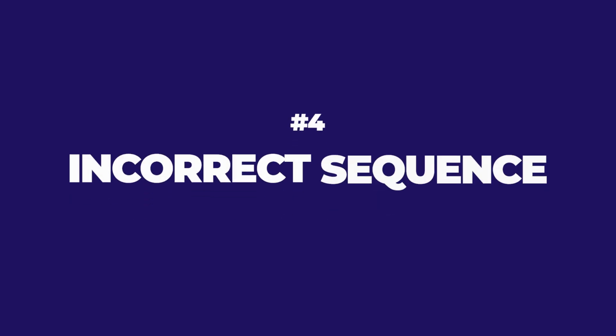Number four, incorrect sequence. Let's say that you came out and you were like, hey, my train has wagon 1, 2, and 3, but because of a bad pull plan, you don't have 2 additional activities in here and you forgot. As soon as that train hits your zones, you'll notice, oh my gosh, I forgot these 2 additional activities, and now the rest of your train back behind will be held up. It will delay your overall phase. It will become your most limiting factor, and it will become a system constraint.